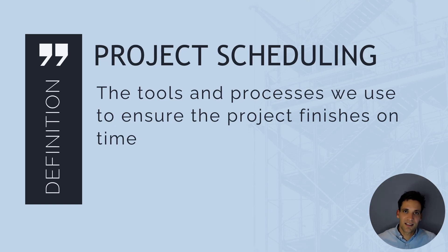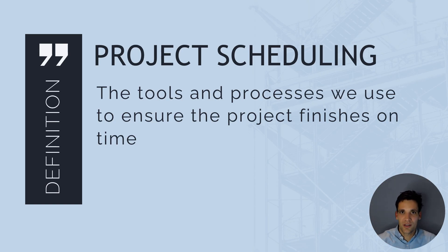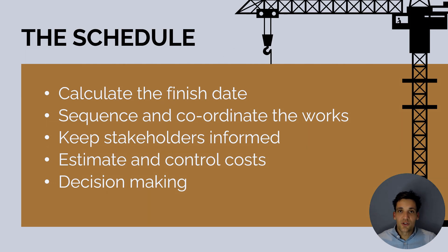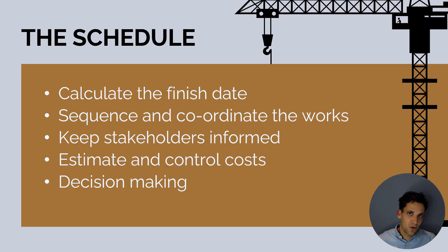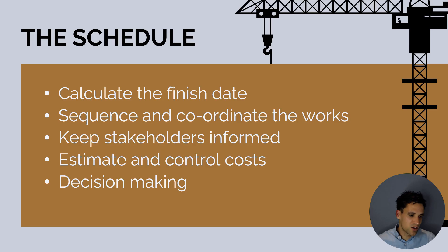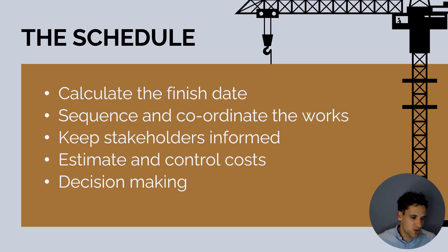The allowable duration for the project consists of tools like developing schedules, implementing a schedule, and monitoring and controlling the schedule. The schedule is the tool we use to do this — it helps us calculate the duration of the project. When we develop a schedule, we work out how long the project is going to take to complete. Once that project duration is fixed, it helps us sequence and coordinate the works to make sure activities occur on the dates they're planned to.